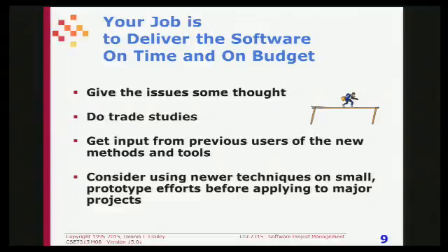Are they saying it's really good, or are the things they're complaining about relatively minor, or are they big deal problems? Some tools have user groups where people go to a conference and talk about the tool, like Usenix is where everybody talks about Unix and Unix-related products. Well, that's a good place to find out what things work and what things don't work. Another thing to consider, if you're trying a new tool, try it on a small prototype effort before you try it on a big, important project. Make sure you know how it works, whether it works, etc.